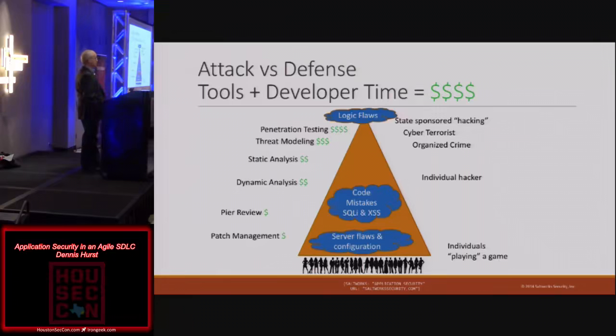What I would strongly suggest against is allowing code to go be developed somewhere, and this is where you're burnt. When code comes back in, there's usually an acceptance criteria, and what I usually work with is whoever does that acceptance. Again, it's the team lead and the Scrum Master usually. Get those folks involved and make sure that they're doing that testing prior to accepting the code. And usually if we look at